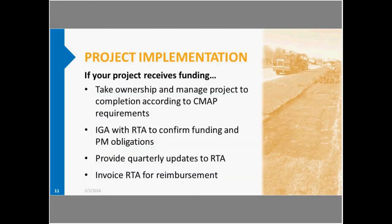So for applicants whose projects are selected for funding, if it's chosen for access to transit, then awarded CMAQ funds, ownership of the project is transferred to the sponsor community, who's expected to manage it to completion according to the standards that are set forth by CMAP, who, like I mentioned, administers the CMAQ program. And they'll distribute information to all the applicants who are receiving CMAQ funding. So you'll be aware of what their process is, and you can also contact me or the RTA planning staff about what the requirements are at that time.